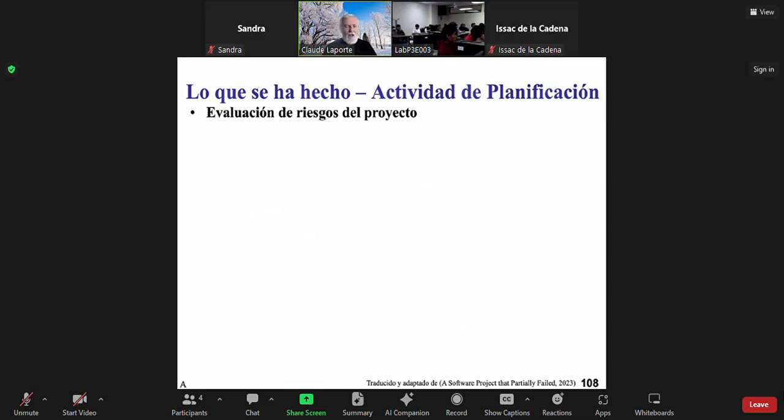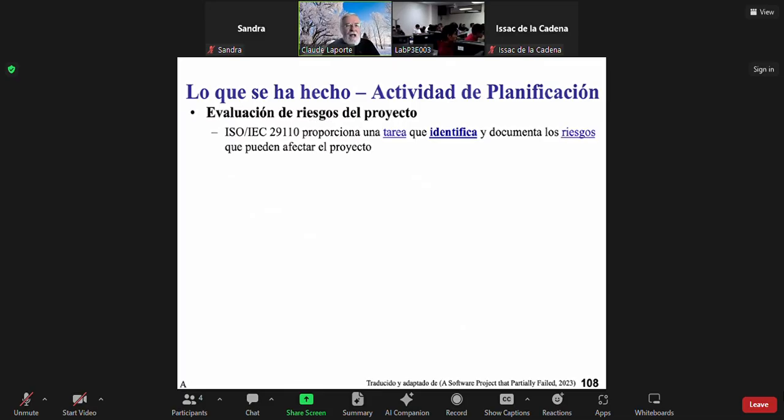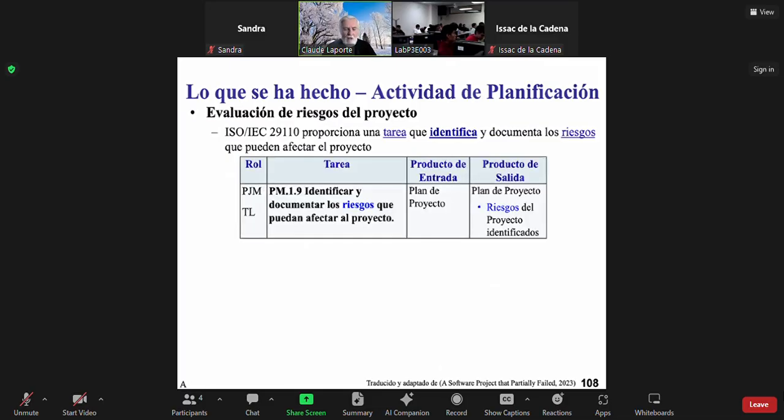So what happened? For information, 29110 will help you by providing a few tasks to help you identify the risk, document the risk, and eventually monitor those risks to address them. But unfortunately, neither Acme nor the supplier assessed the risk at the beginning of the project. If they had used 29110, that task would be part of the project plan, which is to identify the risk.